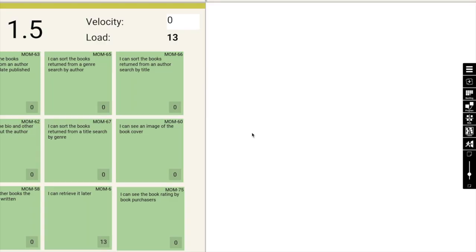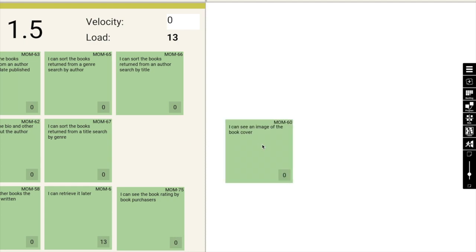What happens when I drag a Jira synced sticky to an iteration or an area which is not synced? There are two different ways the PI Planning app can handle this behavior. Number 1. The corresponding Jira issue gets deleted. You can tell by the Jira issue key that vanishes.